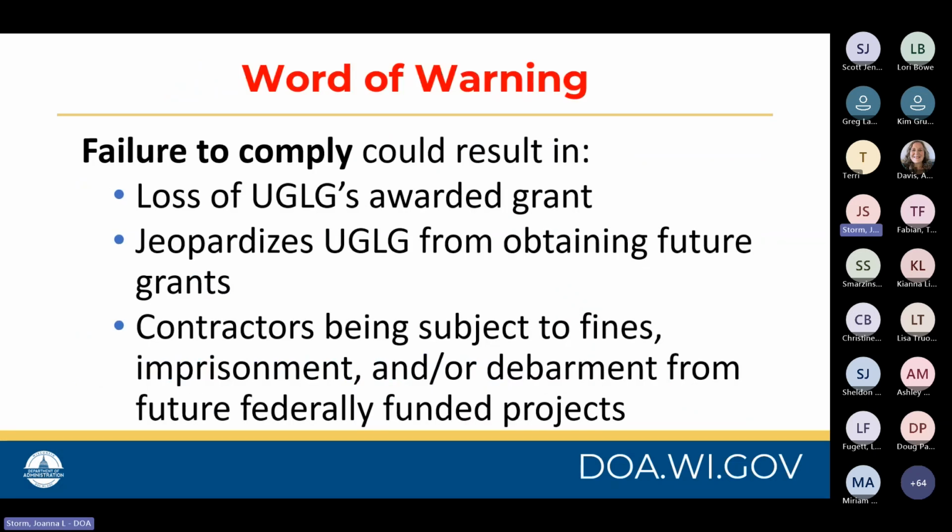So a word of warning: failure to comply with Davis-Bacon or the federal labor standards rules could result in a loss of the municipality's awarded grant, those CDBG dollars. It could jeopardize the municipality potentially from obtaining future grants, and all of the contractors associated with the project could be subject to fines, imprisonment, and/or debarment from future federally funded projects. Those contractors that are specifically running into issues.